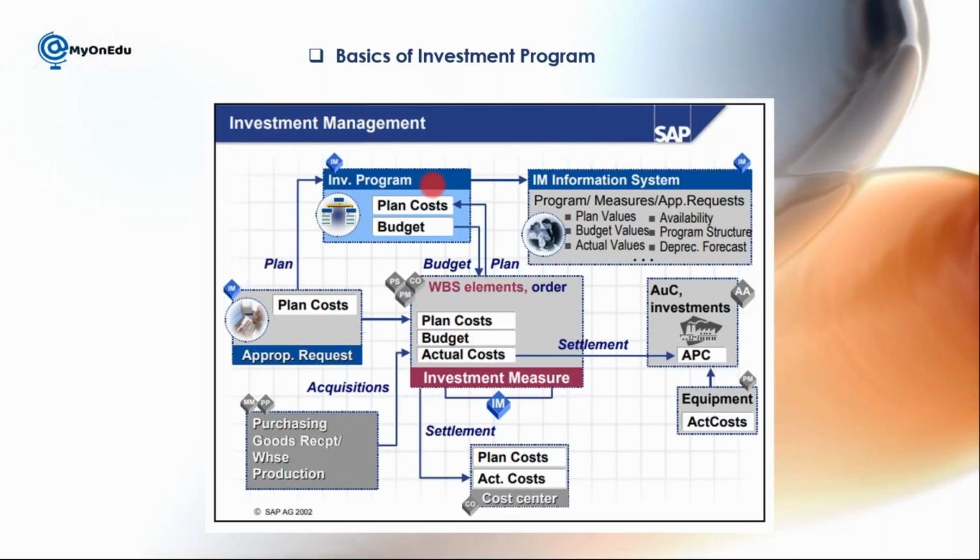And when you are talking about the cost, let's say in my example, I said 40,000 I'm going to invest. So this cost you have considered here, and it will be available within the investment program position, that 40,000 was proposed. This is a plan cost. This is not a budget. Okay. So management can collect all these proposals, and you can keep all these values in one place in the appropriation, in a position. So this is your position where you are keeping all the values, right?